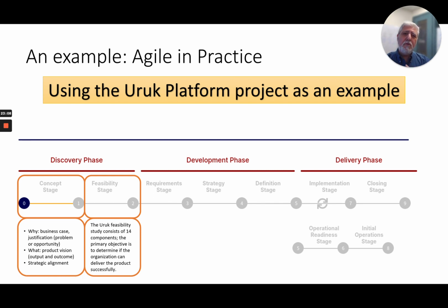So what I'm showing you was an elaboration, with quite a bit of detail, to show exactly how a life cycle would look. That is not waterfall. Yes, there is some sequence, there are some decision points. And so far it looks 100% sequential, but in reality it's not, because while we were doing the feasibility, I was already doing requirements and other things as well. So there is some parallel work or overlapping between these stages, which we are not showing in this image, because it's flexible and you can do it the way you want on a project.